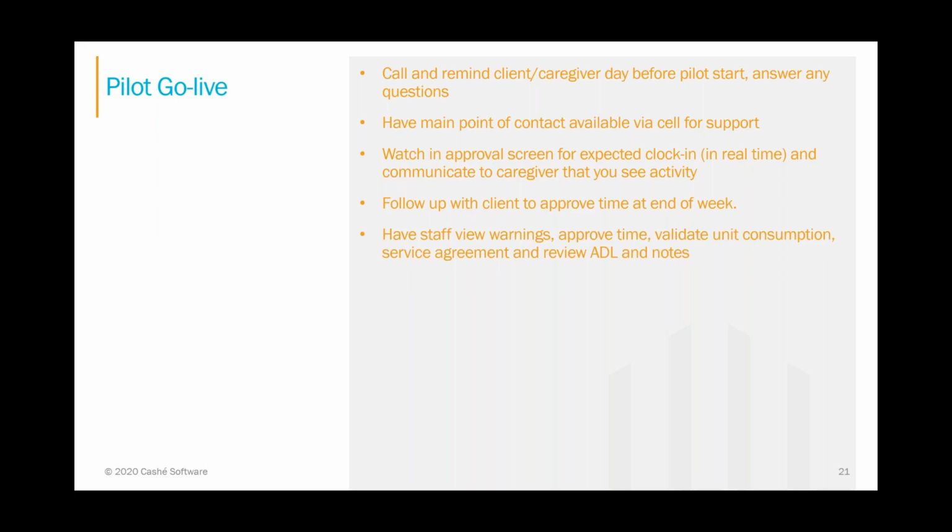So since everything is being automated, you also want to maybe do some validations. Hey, was it the right service agreement? Was it the right unit consumptions? Did the ADLs get recorded? And can you see it? Are the notes being entered? And can you verify the notes? And then once that's done, go through that the next week as well, and then push this to billing and payroll.